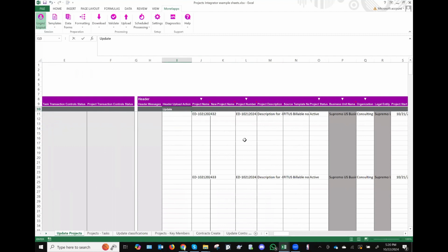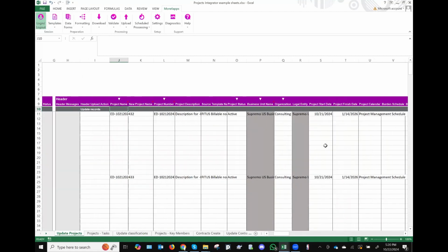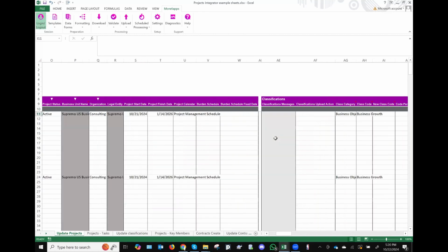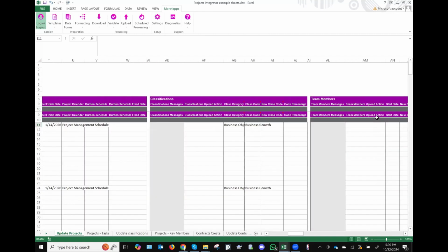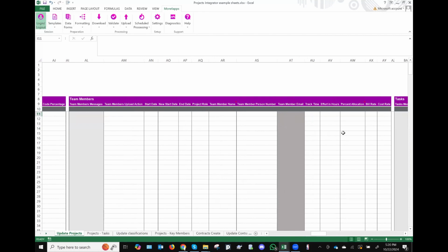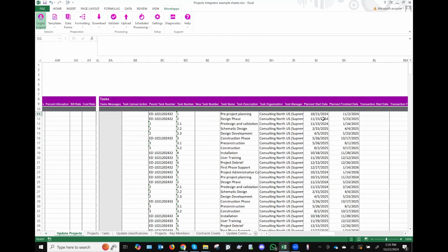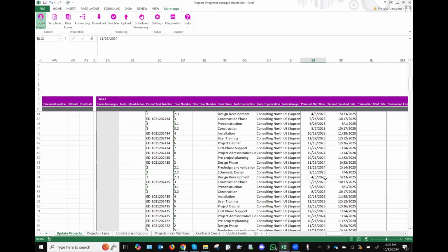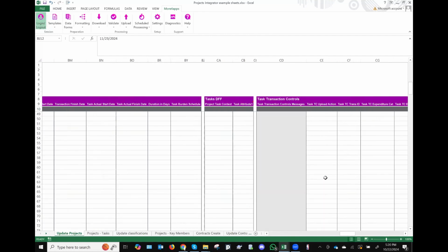Now records, the term records, is going to cascade downward to the child sections also. Once you say update records, that's the difference between update and update records. Update just sticks to this current section, whereas update records will cascade down across horizontally to all the child sections in one sweep. So you don't have to keep putting update at every section. So now you can go in, sprinkle in all of your changes that you want to make on all of these projects and do a bulk update. So very easy to do it in one go.